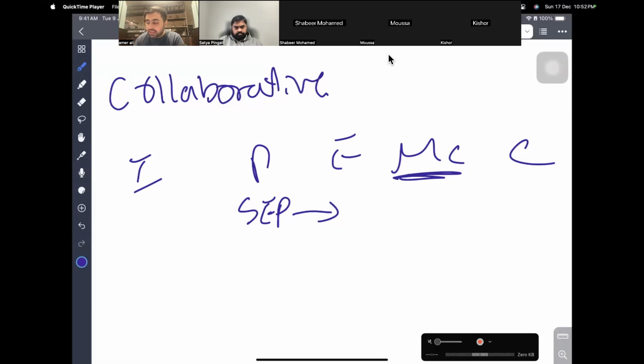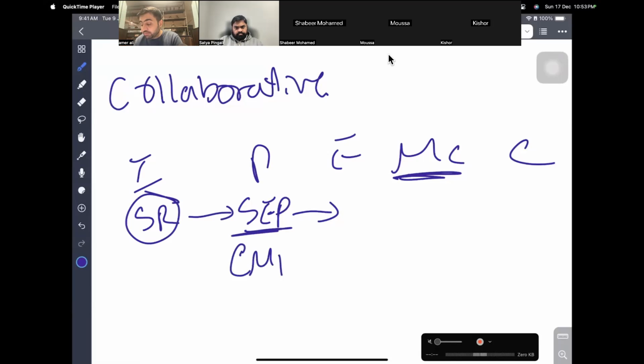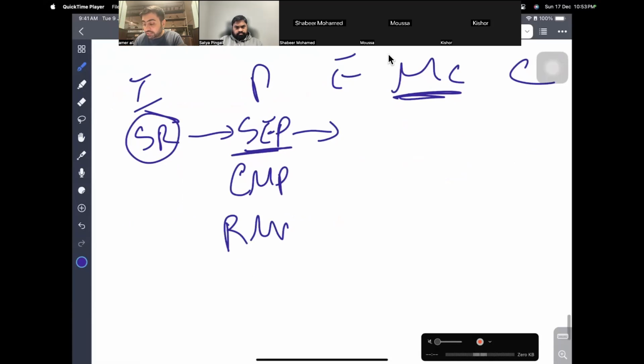At any time, if a new stakeholder is identified, you put them back into the stakeholder register. You don't need a change request for that. But if the plan needs to be updated, then we will raise a change request. And once the stakeholder plan is updated, then we'll update the communication plan. That's the sequence for a new stakeholder. And if the resource management plan needs to be updated, of course, one change request is enough for everyone.